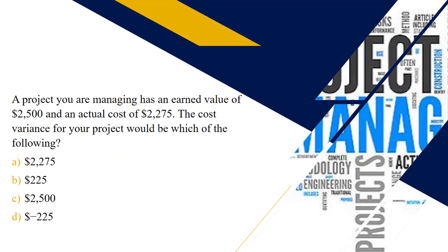Next question: as project managers we work with numbers. A project you are managing has an earned value of $2,500 and an actual cost of $2,275. The cost variance for the project would be which of the following? Cost variance is computed by earned value minus actual cost. We have earned value of $2,500 minus actual cost of $2,275, which gives us $225 — choice B. Make sure you remember that formula.